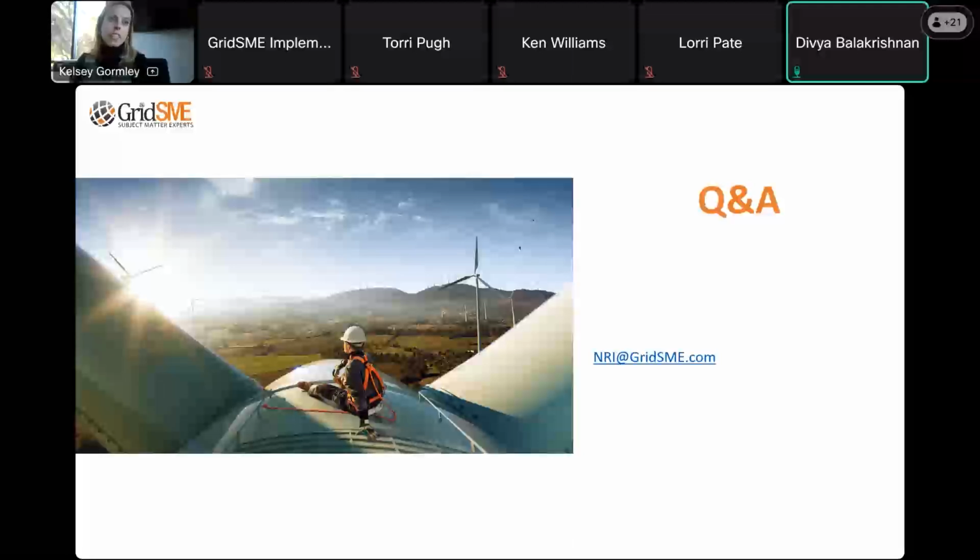How does it work? So your scheduling coordinator is going to be submitting test energy schedules to CAISO. CAISO will either accept or decline those test energy schedules or a portion of that test energy. Timing wise, it really just depends on what they need for grid reliability.